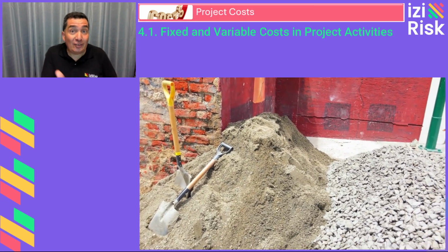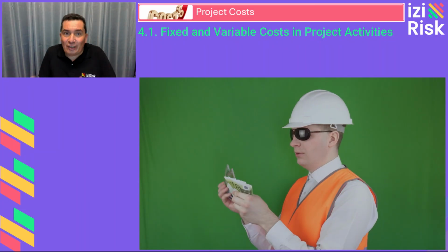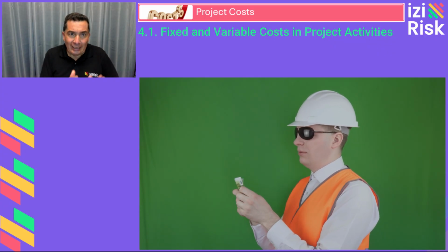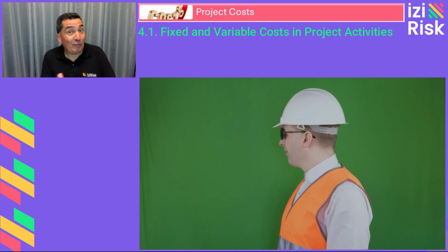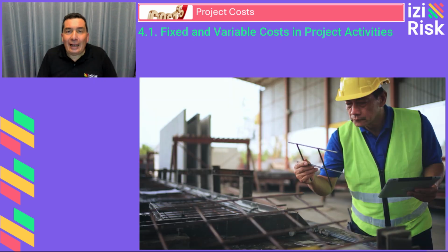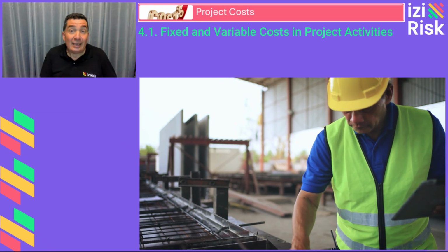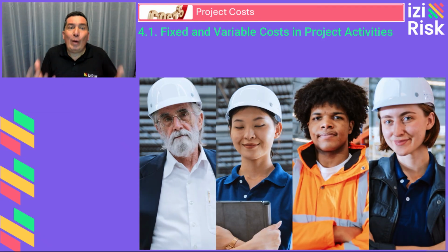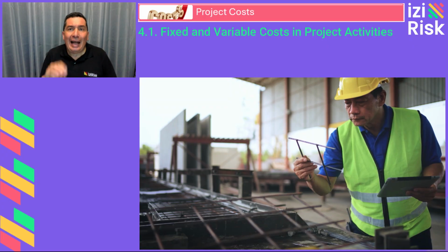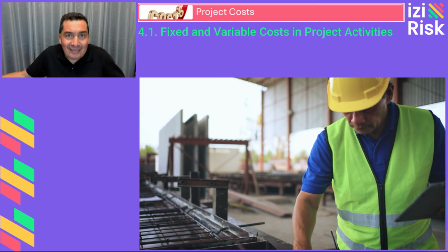Examples of direct costs in a project are the materials specifically used in a project task or the wages paid to workers performing a specific task. However, direct costs can be either fixed or variable, depending on how they are structured. A labor cost example: if workers are paid for the time they spend on a specific task and the task is delayed, their wages are still a direct cost because they are linked to that task. However, the cost becomes variable because it depends on the task's duration.